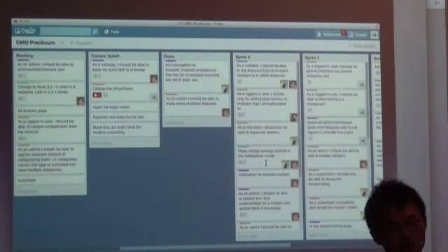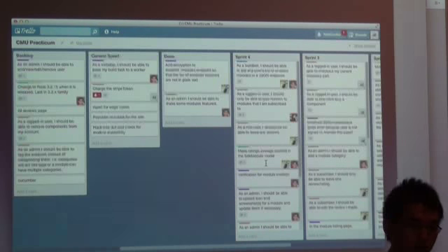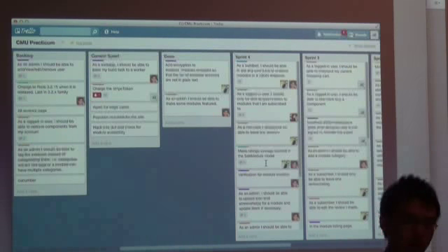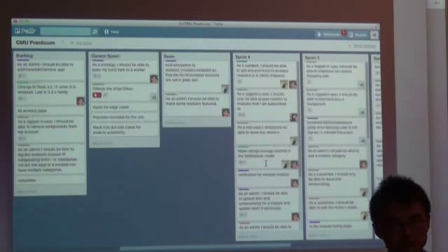Yang typically works on the front end because he's most comfortable with that, Bin sometimes works more on the back end, and Malav and I work on the rest of the stories. Once we are done with a story, we drag it to the done list, and then we pick another story from the current sprint. We managed to finish almost all of the stories during each sprint, so we are pretty much on track, and we didn't lag behind.